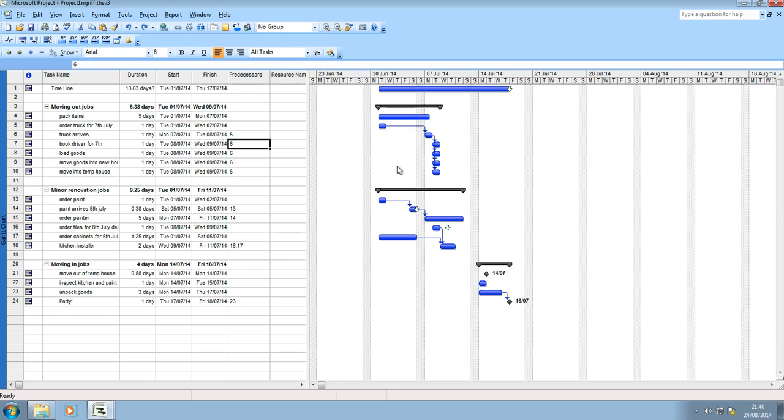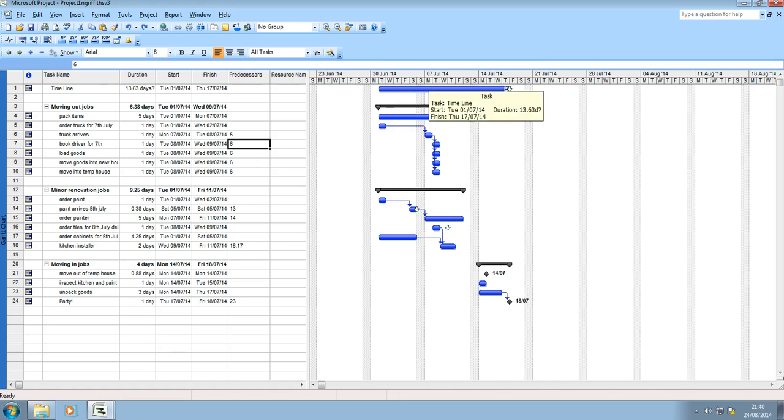So that's our sequential path. Our critical path is basically our timeline, this is our window of the project. Anything that goes beyond the 17th of July is considered outside of the project, the project's overrun.